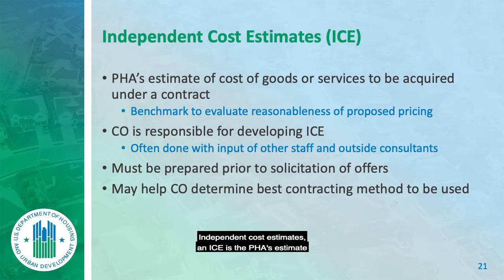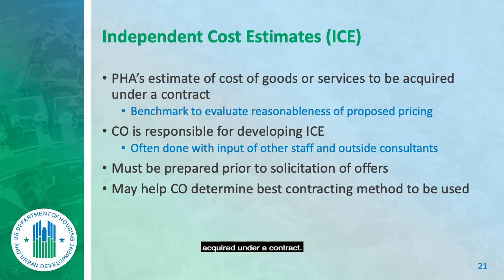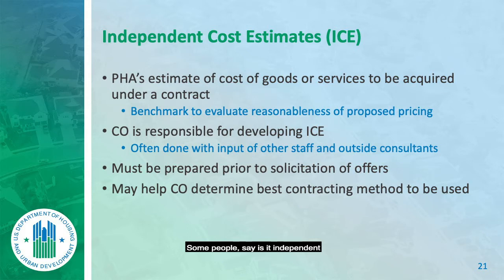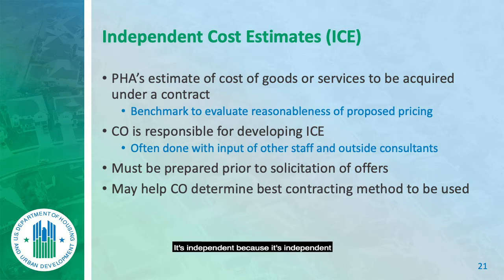Independent Cost Estimates. An ICE is the PHA's estimate of the costs of goods or services to be required under a contract. Some people ask whether it's independent because a third party has to do it — absolutely not. It's independent because it's independent of the bids received.